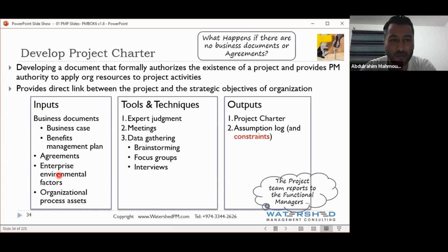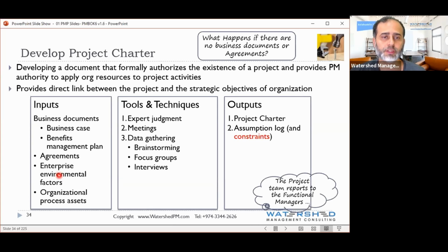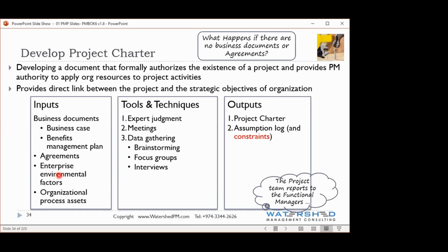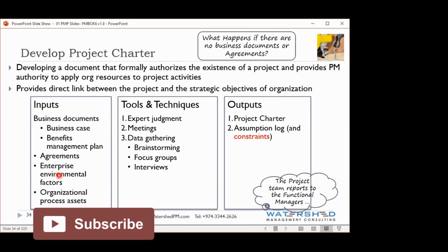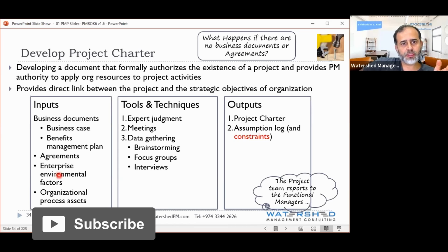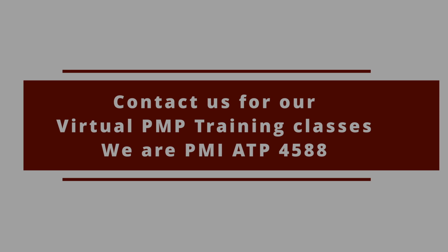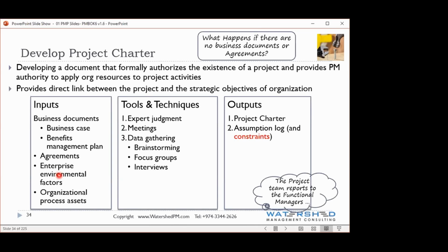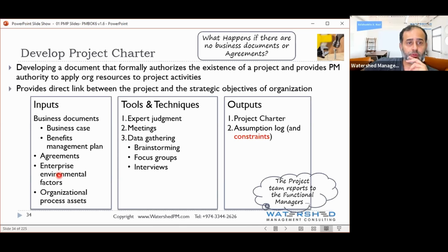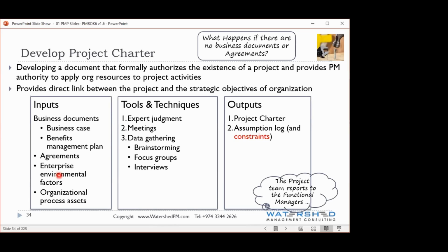Business case, like if we are having the same project, old projects. You said something about the old projects. Now, if you did projects in the past, it means you already have project management plans for the old projects with the company, correct? Yes. Question number 1. To make your life easy, will you not refer to the past project plans? For sure. Next question. Where is it in the inputs? Organizational process assets.